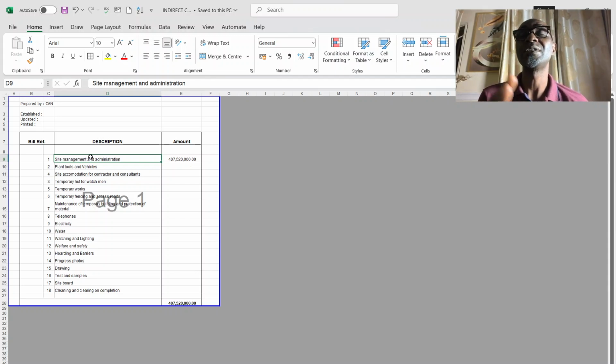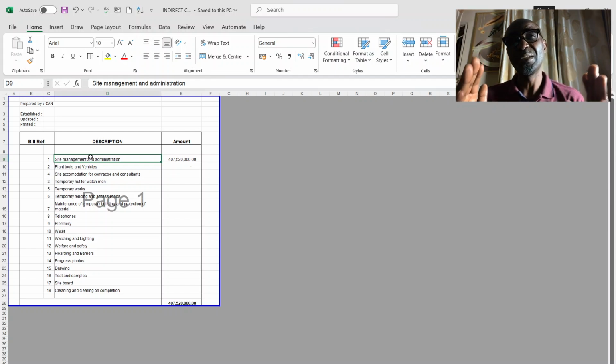What if his budget is for, say, 8 months, and the structural work is finished in 8 months? He needs to leave, either deploy to another site or demobilize completely. So that is why you need to do systematic planning for all of the staff, when they come in and when they leave.